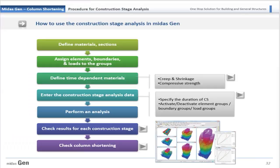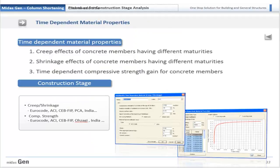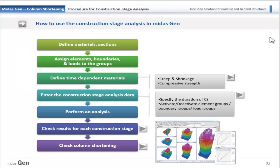This is the flowchart in Midas Gen. Firstly, we create the model and define materials and sections. Then, while assigning boundaries and loads, we define element, boundary, and load groups. We need to define time-dependent materials like creep, shrinkage, and compressive strength — these can be defined manually by users, which is useful when experimental material properties are required. After time-dependent property definition, we define the construction stage analysis data: the duration of stages and activation or deactivation of element, boundary, and load groups in every stage.